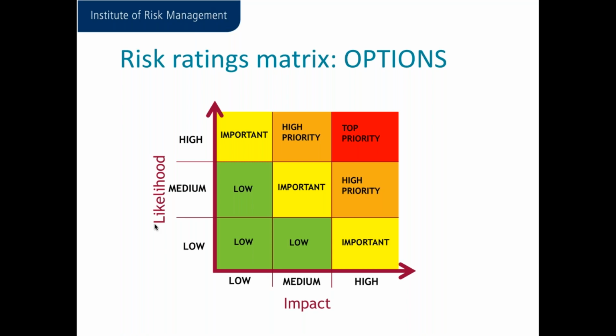You'll remember something very similar to this in the Hopkins book on fundamentals of risk management, although there's a lot more granulation because the picture in the book has lots of little boxes in there, and he talks about having the 4 C's for threats there, which is critical, concerned, cautious, and comfort zones. However, different organisations have different kinds of risk matrices, but it's helpful for us to think about and use these because this gives us an idea when we rate our risks, where do those risks sit? Are they important or not?